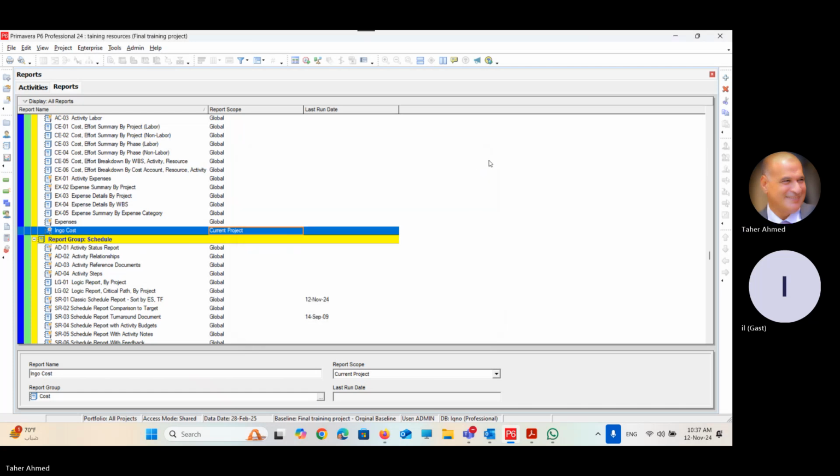Right. This is the second part of the report. We discussed earlier how to print a graphic report. Graphic means that it is a layout, and all you have to do is just go there and print it. Or tabular report. This is the tabular report. Tabular report means that you can generate any report which you can customize later on, and you can group it in a batch as well to be print previewed, or printed directly to the printer, or saved as a file or email attachment.